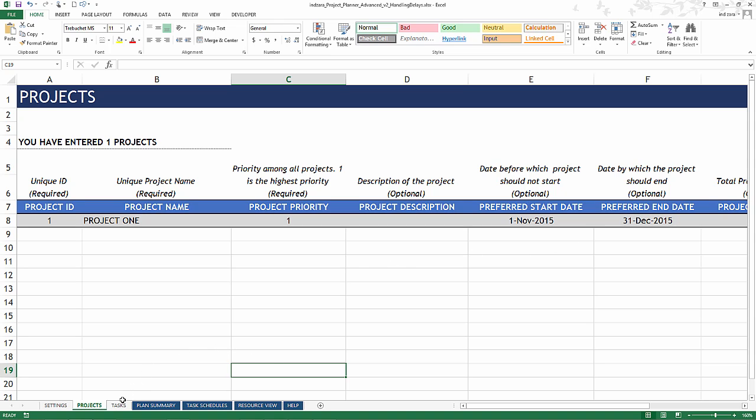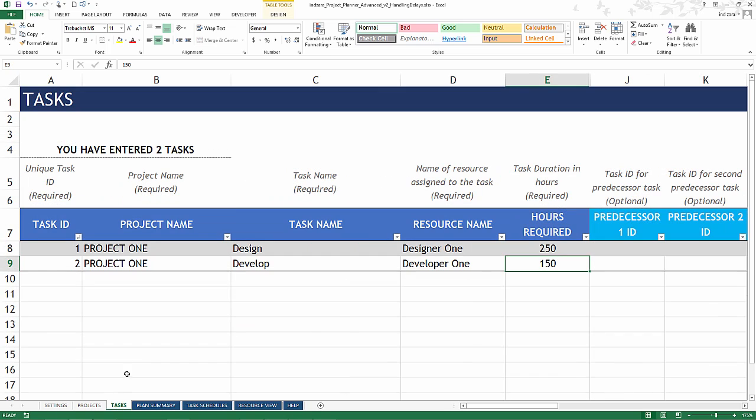I'm going to go to the task sheet. We have two tasks: Design and Develop. Design is assigned to Designer 1 and Develop is assigned to Developer 1. The Design task takes 250 hours of effort and the Develop task takes 150 hours of effort.